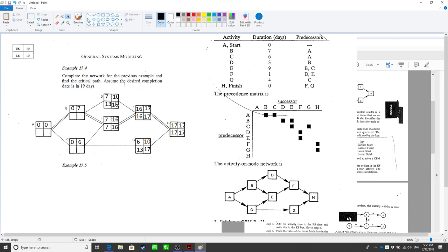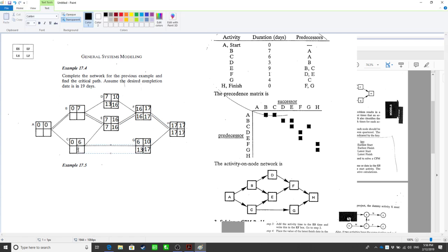This thing actually, it would take the smallest. When you go backward, take the smallest. When you go forward, take the largest. Okay. So this is a tricky one. Which one is that, 7 or 13? 7. Yes.